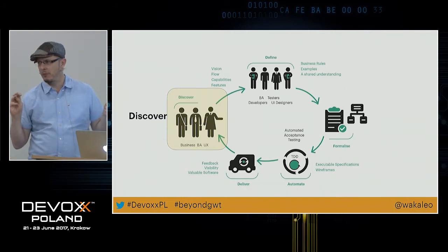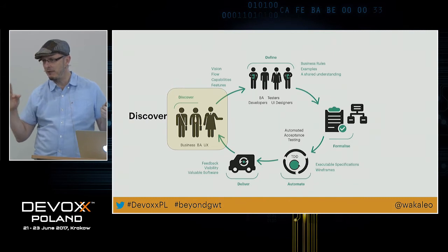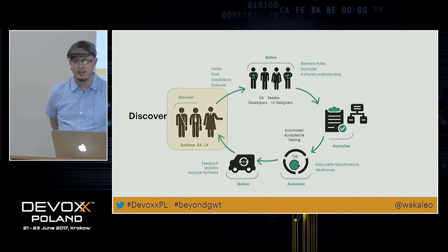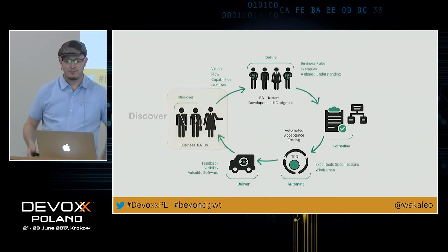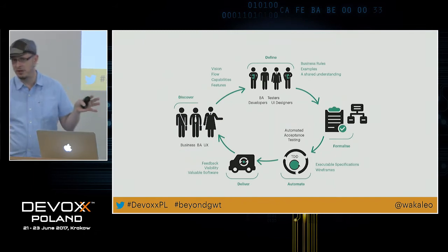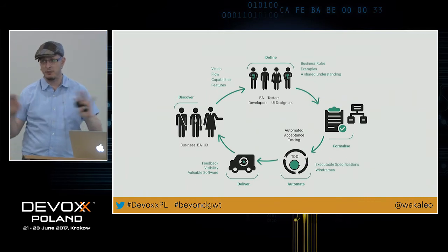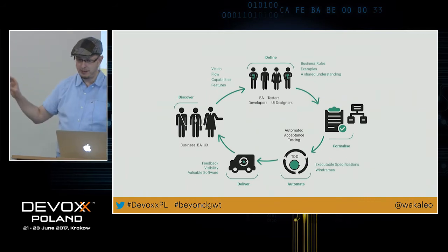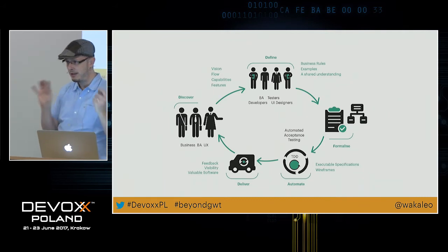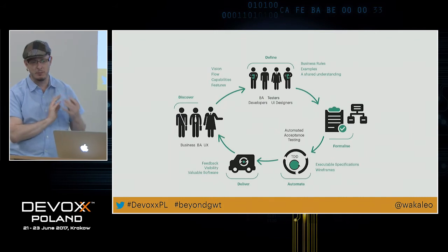What you know about a software project when you start is that there will be stuff that you don't know. And the tricky bit is knowing what you don't know, and knowing that you don't know something and then looking into that area so that you can reduce your uncertainty. When you've got a bit of a higher idea, we call this a breadth first approach. So you discover what you need, discover your requirements, get a high level understanding, then you go into a more detailed look at a particular feature or particular capability that you want to build.